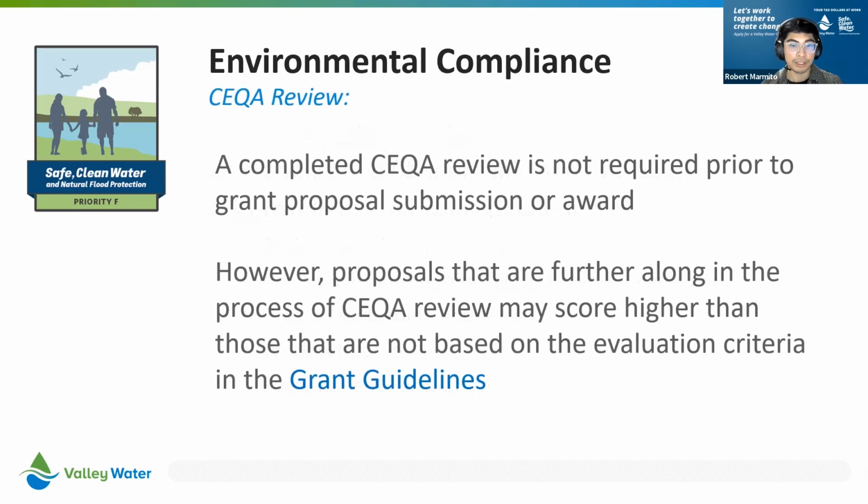All right, so a completed CEQA review is not required prior to grant proposal submission or award. However, proposals that are further along in the process of CEQA review may score higher than those that are not, based on the evaluation criteria in the grant guidelines. So again, if you have done any CEQA research, inquiries, permits, studies, or anything of the sort, it is always a good idea to include that with your application.